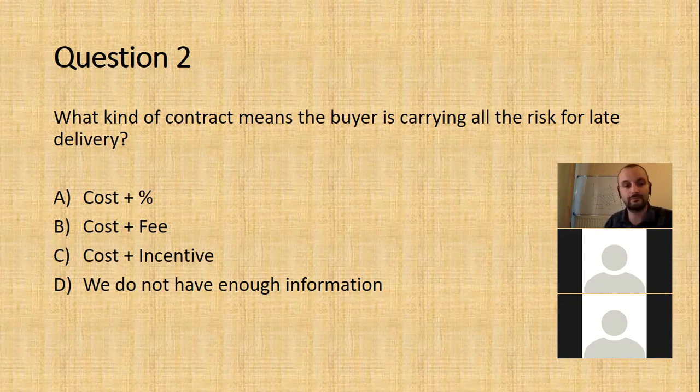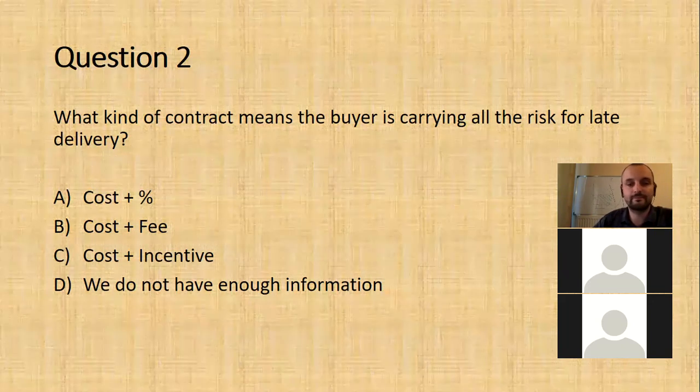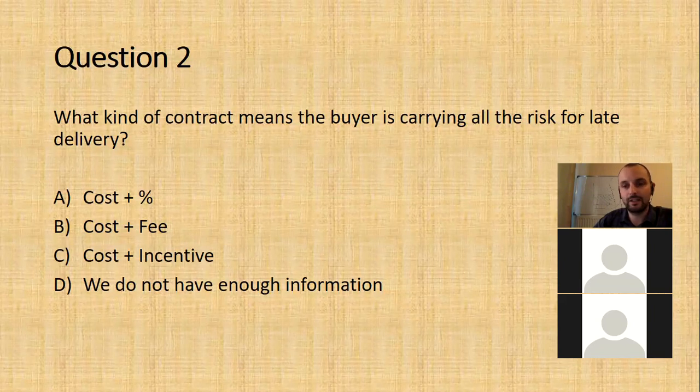Sir, for cost plus percentage, because as the time of the project increases, the cost will increase, and then the sponsor will have to pay more. Okay, Cardo, what did you put? So cost plus percentage goes loose, if it's delayed delivery. Yep, excellent. So you're both correct.